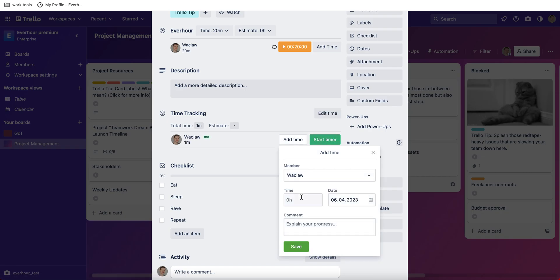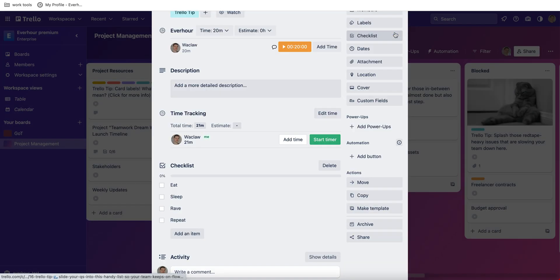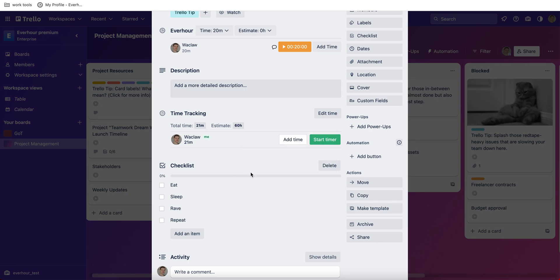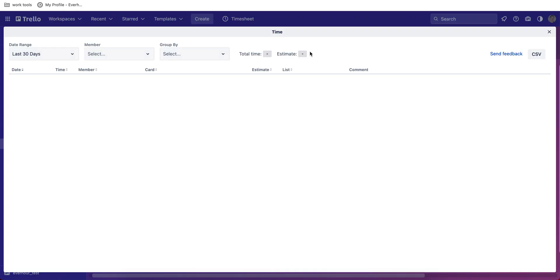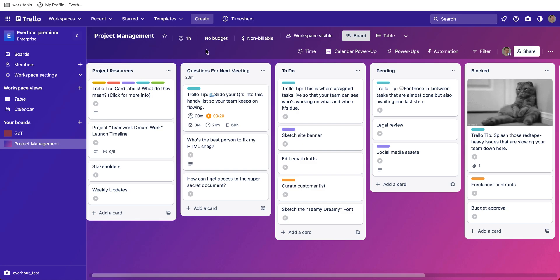When you open a card you can see the time tracking field in the middle, where you can start tracking time with a timer or add hours manually. You can also update those hours if you think they're incorrect, as well as set an estimate for the number of hours you expect to spend on a card. When you go back to the main board screen, you'll see a time icon that allows you to build very easy reports, which you can download as a CSV file to understand how much time was spent on different activities. This functionality is completely free via the power-up.